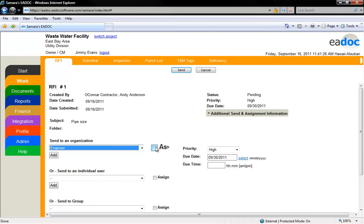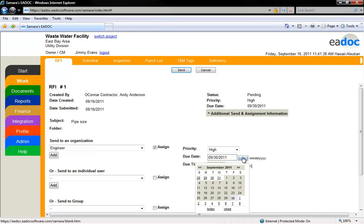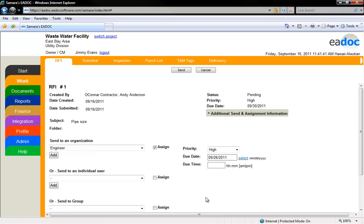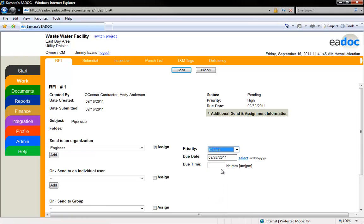You can make the RFI pending on the recipient by checking the Assign box. You can also select a due date and priority for the user or organization you are assigning the RFI to. To add a due date, click the Select link and a calendar will appear. Select your due date from the calendar — it must be sooner than the original due date. To assign a priority, select from the drop-down menu. When all of the appropriate selections have been made, click the Send button to transmit the document.